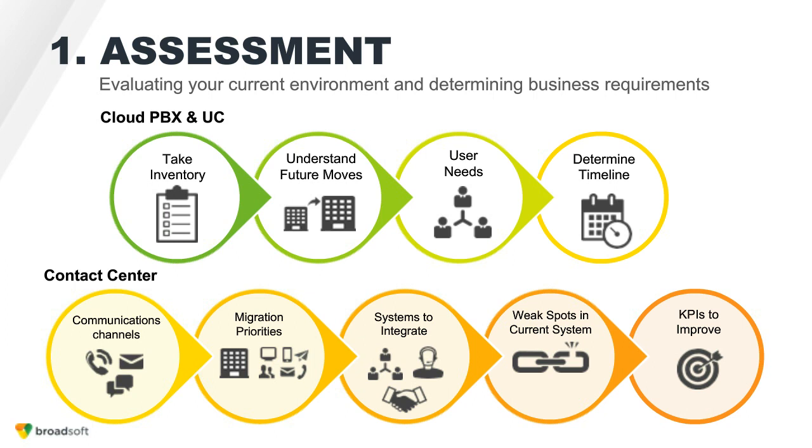The next thing we do is think about how we segment this migration, because you're not going to move the entire contact center on day one, and what's the best way to prioritize the overall migration? That really depends on the contact center and the business that it supports. We've looked at this from migrating specific sites, one site at a time. We've looked at it by migrating different agent groups and agent teams, one team at a time.